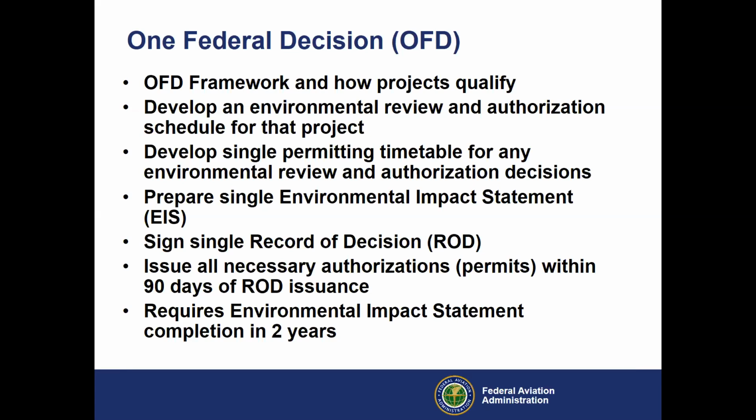It sets that timeline for about 2 years and has subsequent authorizations required to be issued within 90 days of signing a record of decision. An authorization being, think about a Clean Water Act permit, something along those lines. Sometimes, that might look at a memorandum of understanding with SHPO and maybe some tribes and whatnot. So a lot there. Basically, it really synchronizes the environmental review process for all agencies and forces agencies, if they aren't already, to talk and be planning in a synchronized and concurrent fashion.